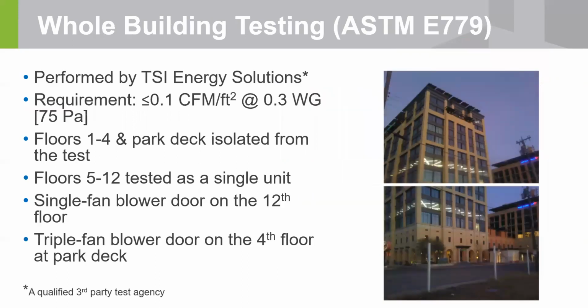Now, doing all that in the building, we felt like with all that inspection protocol it's very tight. Every possible air leakage path that we could identify looks to be addressed and sealed up pretty good. So now, in that Division 7 spec for the air leakage, they contracted a qualified independent testing agency that could do that whole building testing. These guys were TSI Energy Solutions, and they were made aware of the requirement.